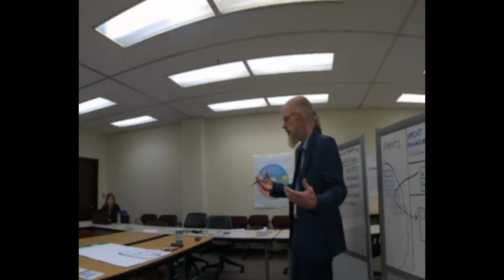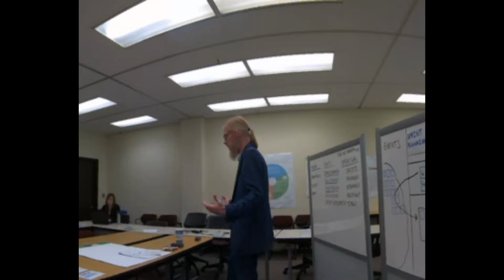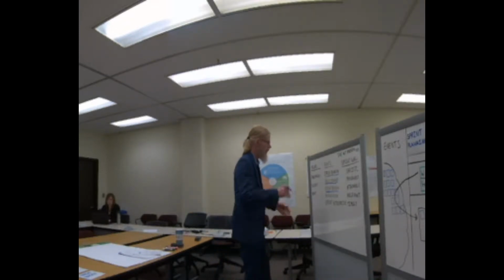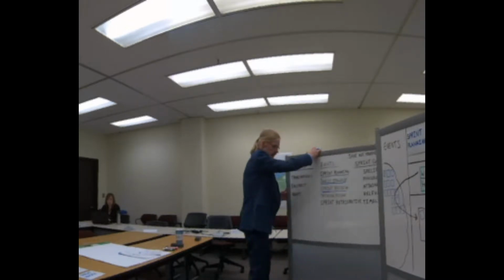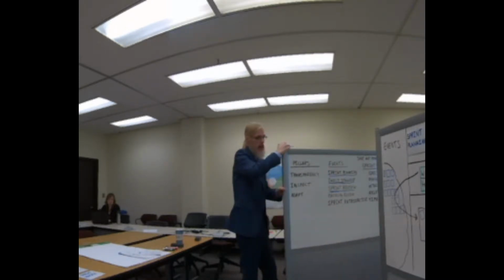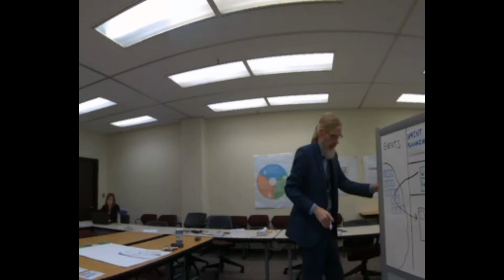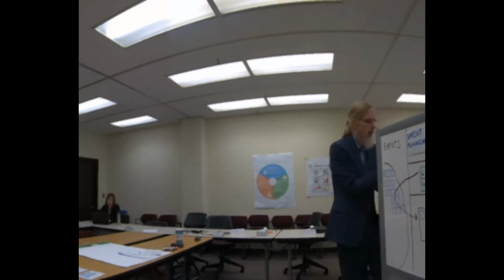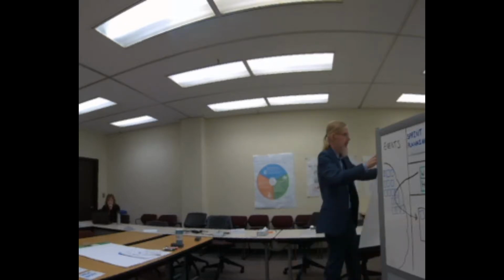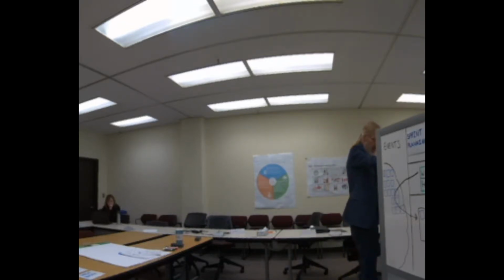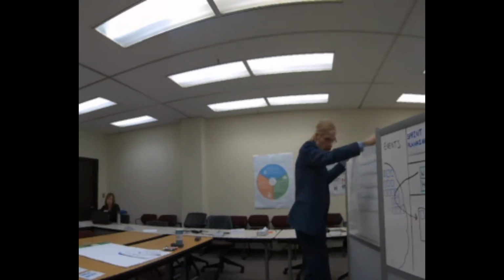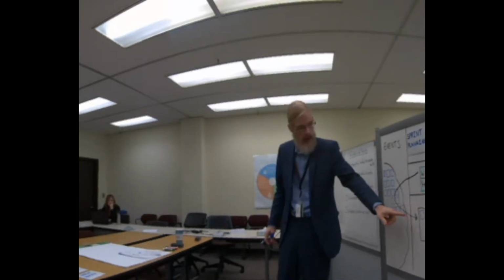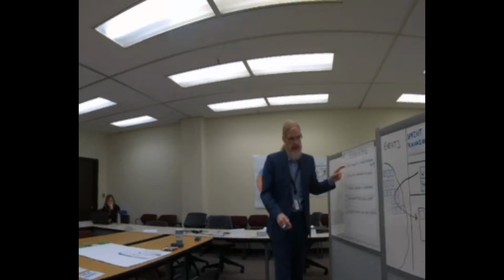And we check to make sure they meet the definition of ready. Okay? Definition of ready. So definition of ready, we talked about this yesterday. We cannot move this item from the product backlog to the sprint backlog unless it meets the definition of ready. And we do this again one at a time.